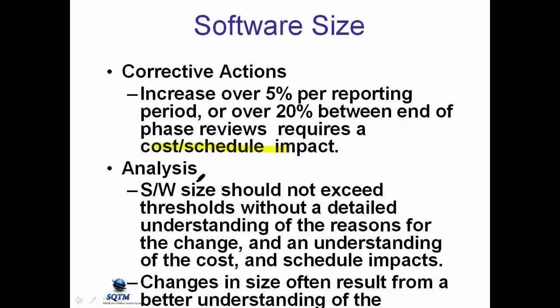Analysis. Software size should not exceed thresholds without an understanding of the reason. You have to know what the reason is, why the size estimates are increasing. And again, change in software size often results from a better understanding of the software, the detailed software requirements, which you may not have been aware of when you started the project, with just some high-level requirements.